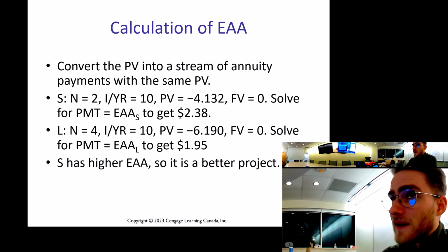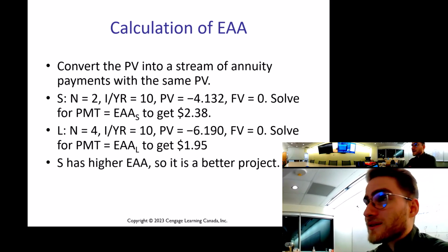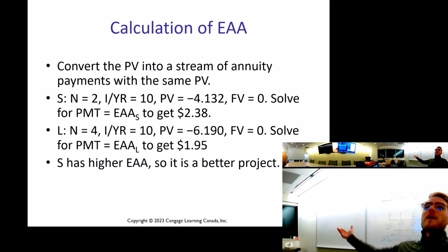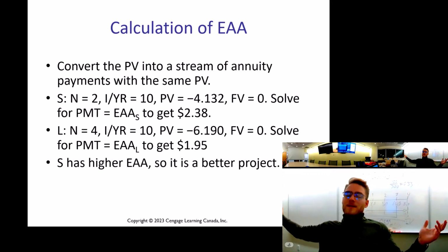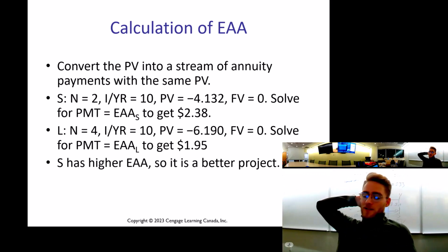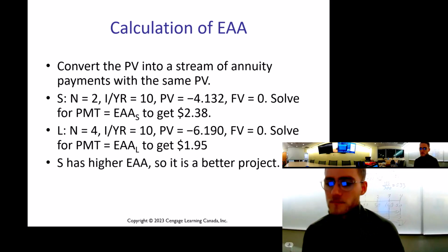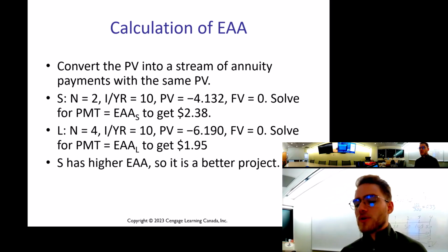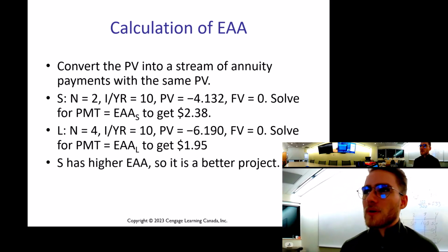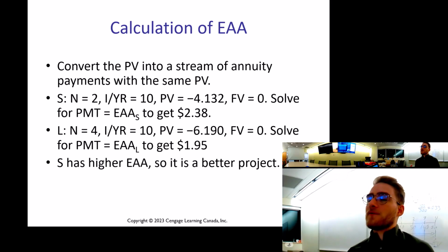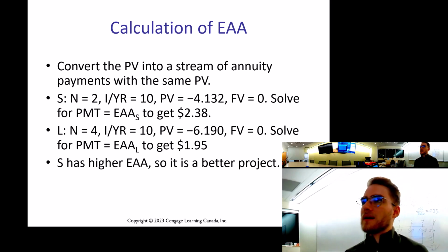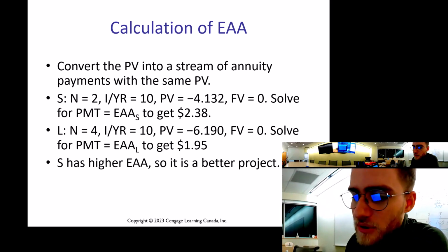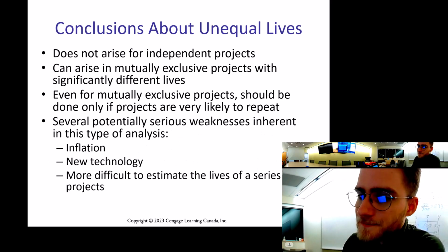Because if I earn my $100,000 in year 1 and $100,000 in year 2, in year 3 and year 4 I'm free. I can go and do another project. Maybe I take on another project where I earn another 100,000, or at least another 50-50, right? I have extra time, because I'm making the most of my time. That's the argument with equivalent annual annuity: what's my average NPV per year? Based on my time frame, am I making the most return I can? And with that extra time that I have, maybe I can make more. So that's what an equivalent annual annuity is.